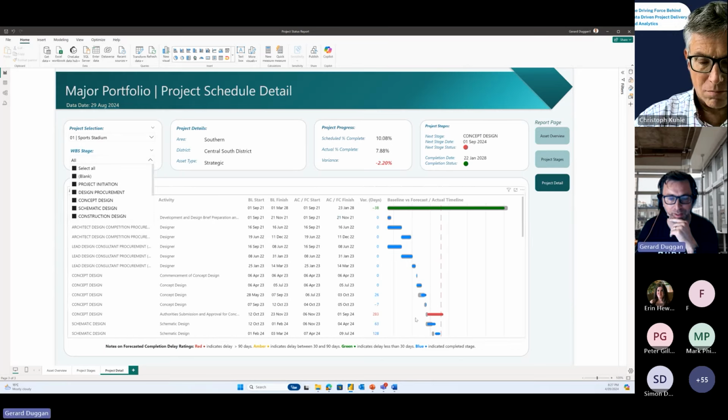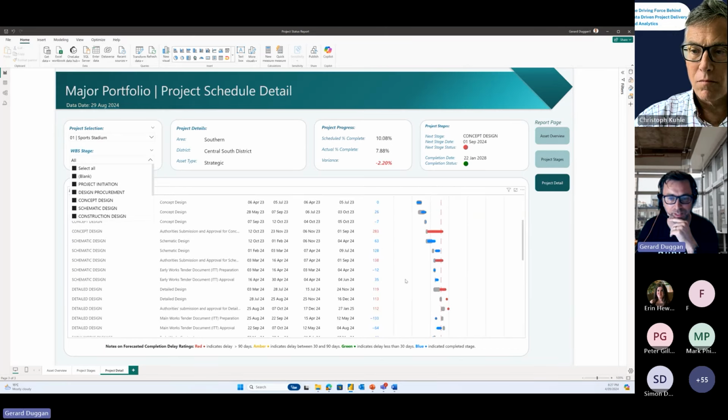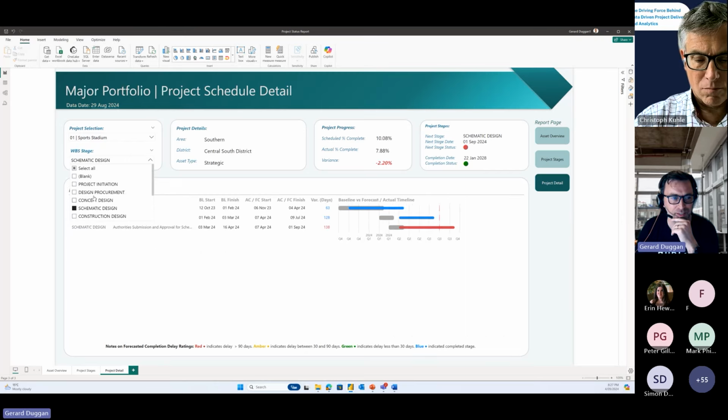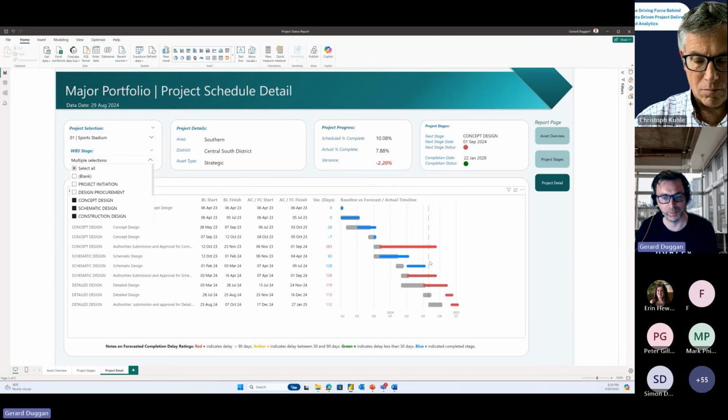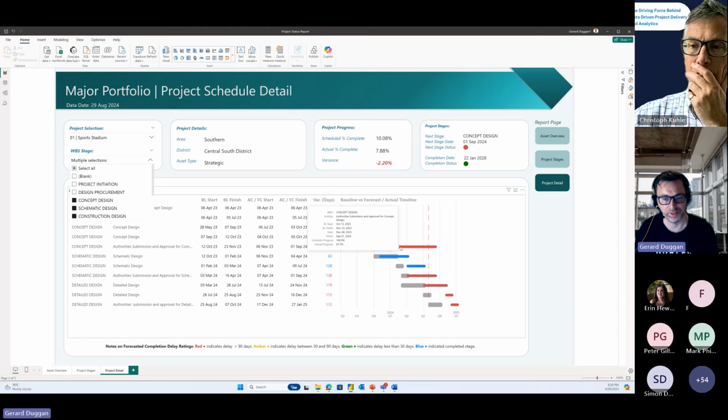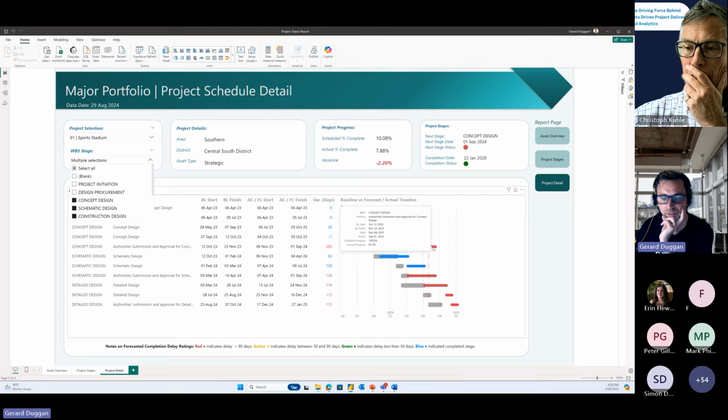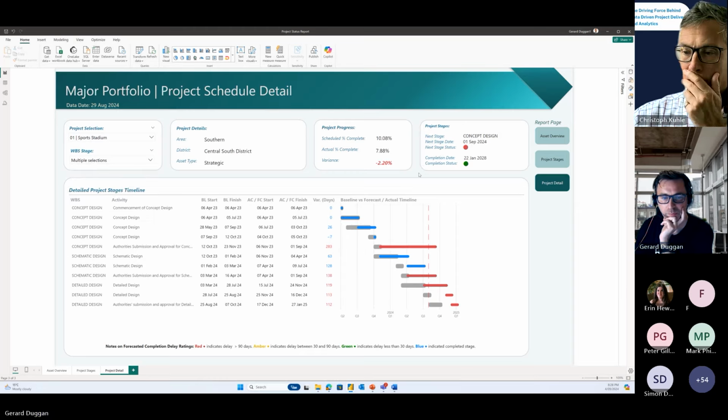we can then go into individual activities and see, okay, if we said there's issues with our design, what's happening with design, and we can go in here and say that all our approvals are being delayed. So you can come in here and see what's the problem, and then maybe that points to an issue with getting client approvals for your design or something like that. So then someone can go in and start chasing a client maybe to get approvals.